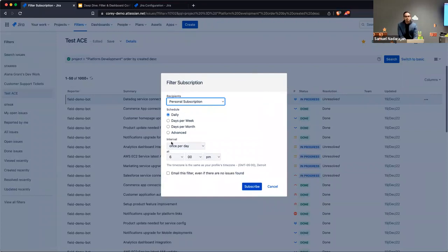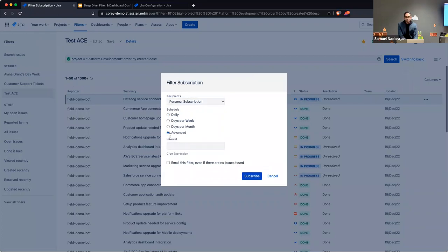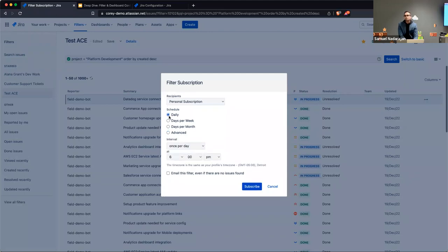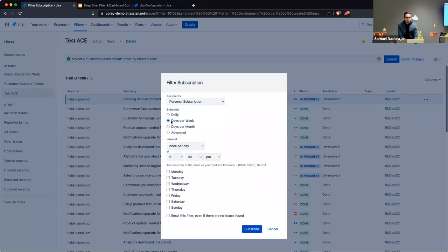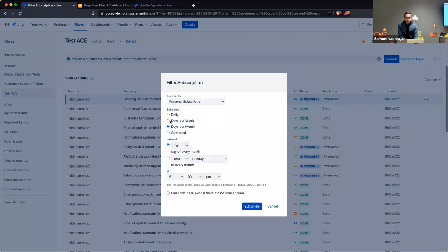Once you specify recipients, you can configure the schedule for when your filter executes. If you're familiar with specifying cron jobs or other scheduling tools, this is pretty straightforward. You can choose the frequency — daily, weekly, monthly. If you hit the Advanced Expression option, you can also put in an actual cron expression if the standard options aren't sufficient.